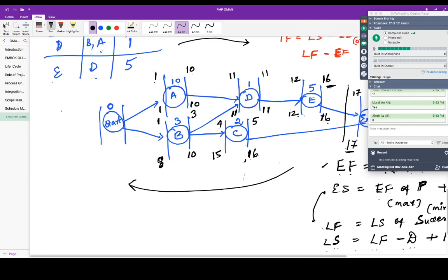If you want to use the start milestone, it will look illogical, but it's okay. How is the early start? It will be 1, starting on the first day, so 1 plus 0, 1, 1 minus 1 is 0. And while you're coming back, you will take the minimum, which is 1 here. So 1 minus 1, 0, 0 plus 1, 1.